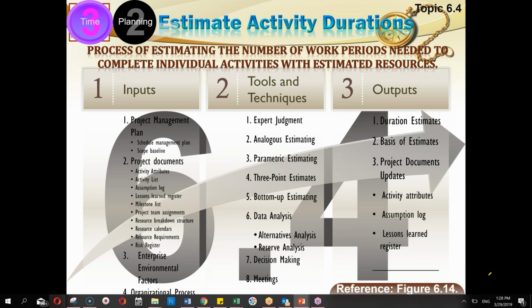Now you multiply this amount with the total square feet available. That's 3,000 square feet into 4,000. This will be giving you an approximate estimate of how much it will take. This is parametric estimate.